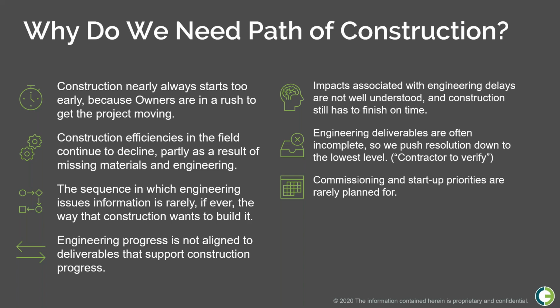And the last one, and another big area for focus for AWP: commissioning and startup priorities are rarely planned for, right? Construction is not the end of it. When construction finishes, when we get to mechanical completion, the facility doesn't switch on. There's still quite a bit of work to do to get it going. So we need to understand the transition from engineering to construction and from construction to CNSU, commissioning and startup.